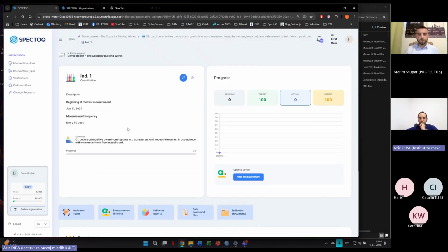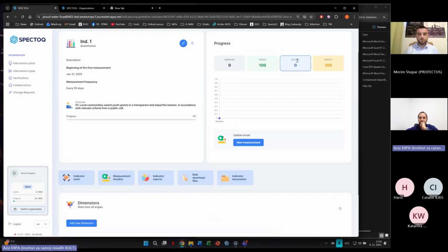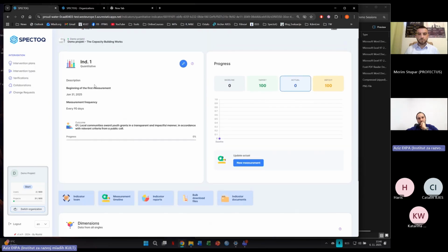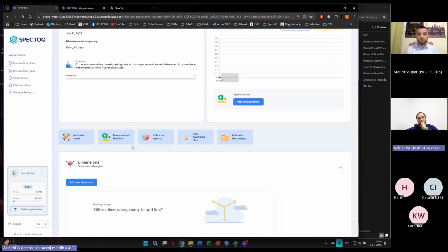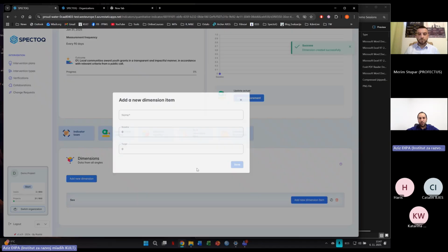Which is also important to note, when we are providing the disaggregation variables or subvariables, we should provide targets for every category under the disaggregation. So for example, we do have 100 participants, and we are setting the sex disaggregation. We could provide the targets for every category under the sex disaggregation.